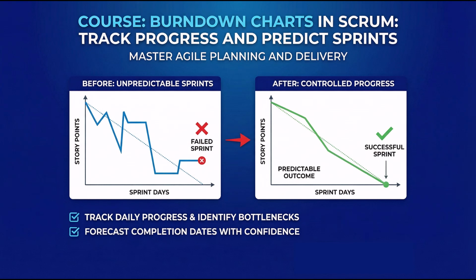Actions taken. Broke all tasks into 4-hour increments or smaller. Changed team norm. Update Burndown twice daily, regardless of completion. Scrum Masters spot-checked Burndown at 10 a.m. and 3 p.m. daily. After, next sprint showed smooth daily progress. The sprint after that, they finished 1 day early. Velocity increased from 28 to 35 story points.